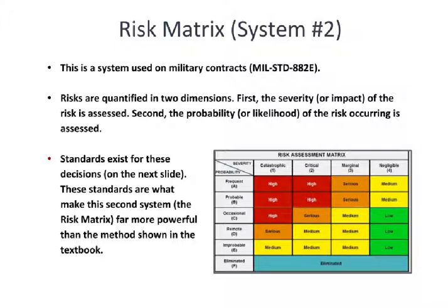It's also important to understand that the matrix helps you realize how things interconnect. If you have a catastrophic severity that's very likely to happen, so frequent occurrence, obviously that's a horrible place to be. You're up here in the red part of the risk matrix. You never want to be in that. That needs to trigger in your mind as the project manager that something needs to be done to alter this reality that you're living in, because this is just a risky place to be.